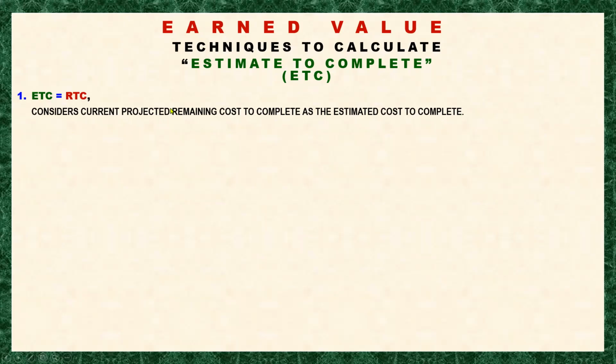In this technique, the estimate of the remaining total cost is performed by the assessment of past period performance or actual progress trend, including unforeseen items which are part of the scope of work, with the estimated remaining duration.